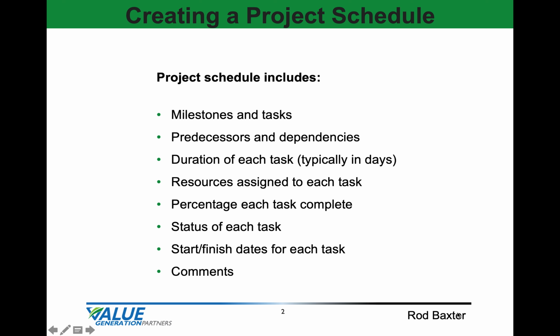Project schedules include milestones and activities, dependencies, duration of each activity, typically in days, resources assigned to each activity, percentage complete for each activity in increments such as 5%, 10%, 20%, and so on. The status, is it on schedule, ahead of schedule, behind schedule, complete, or not started, and a start and finish date for each activity, as well as any necessary comments.